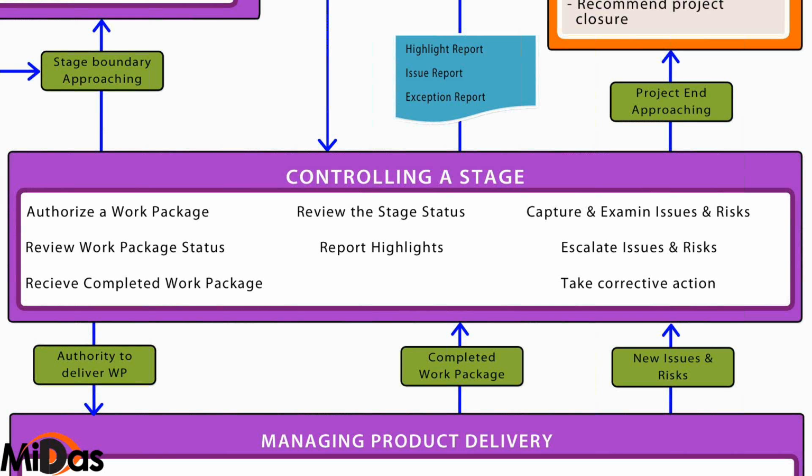So you are breaking down the product into multiple products. Now, you can decide which product is going to be delivered in which stage, how it is going to be approached, and how the overall product is going to be approached. Now, that one product within a stage, let's say the keypad within the stage, can again be broken down into multiple work packages, or it can be delivered as one single work package.